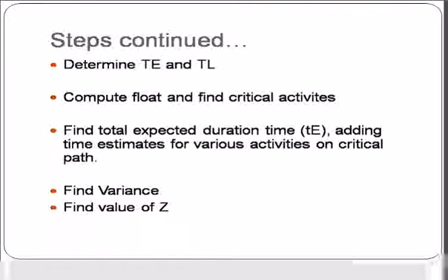The next step is to find the total expected duration time, that is represented by TE, capital letter. How can we calculate this TE? By adding the time estimates for the various activities on the critical path.